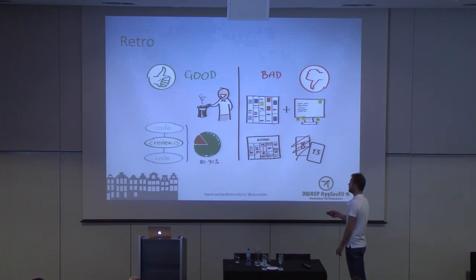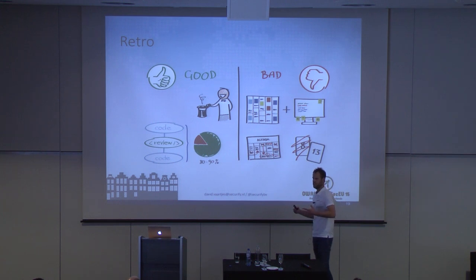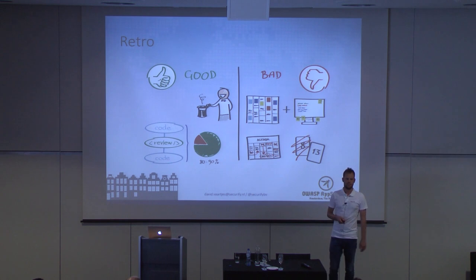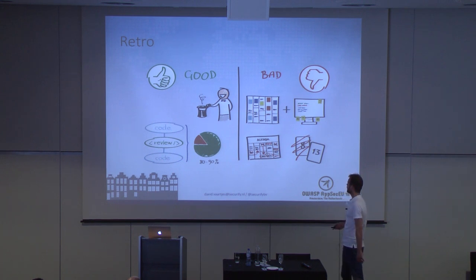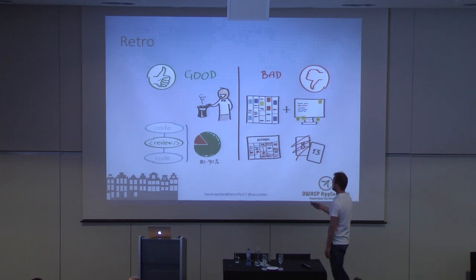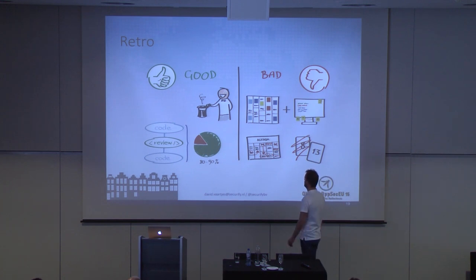And because we were doing this during the sprints, we had just separate user stories that didn't come together, so there wasn't a working environment or whatsoever. For some of the activities we really needed a running environment, because we wanted to verify some things. We thought it might be bad from a code perspective, but you want to verify hands-on. So we need to wait until the end, so that's about the 20 to 10% which we have to wait for until there was a test environment up and running.